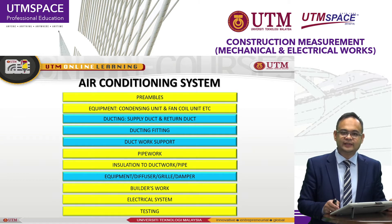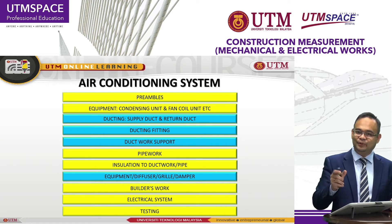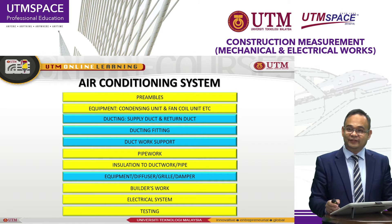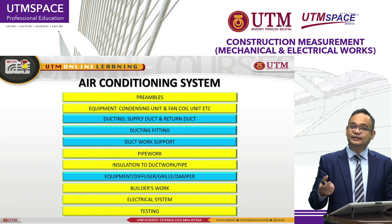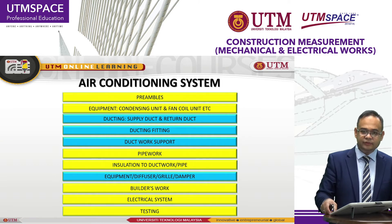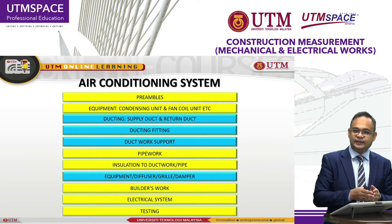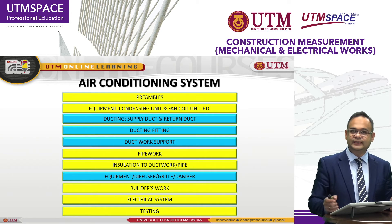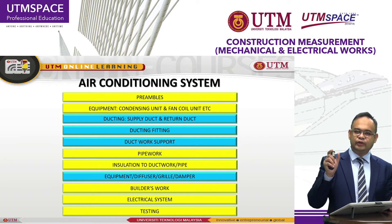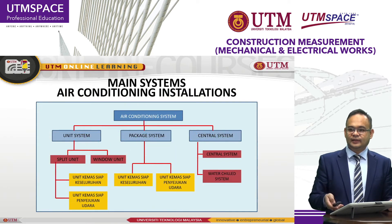For the central air conditioning system, in addition to the split unit items in yellow, we need to add items shown in blue — specifically ducting: supply and return ducts, duct fittings and accessories, ductwork supports for hanging ducts from beams, and equipment connected to the ducting such as diffusers, grilles, and dampers.